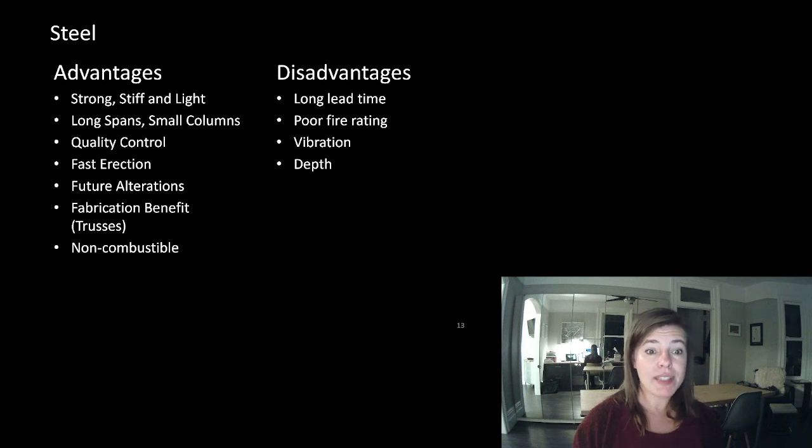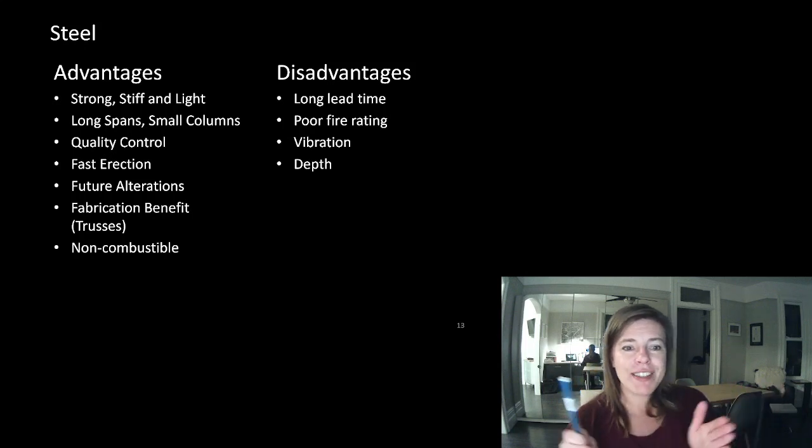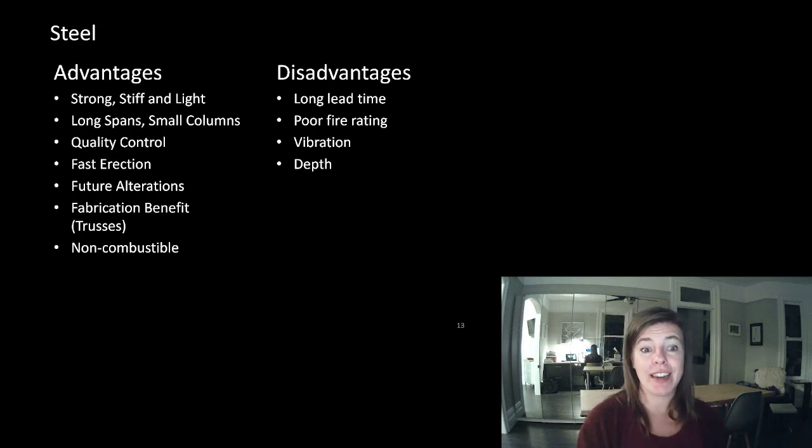And then all of a sudden the steel goes up. So the full construction time from we're hiring you to this building is built is probably pretty similar in steel and concrete. But what chunk is on site and what chunk is off site varies.